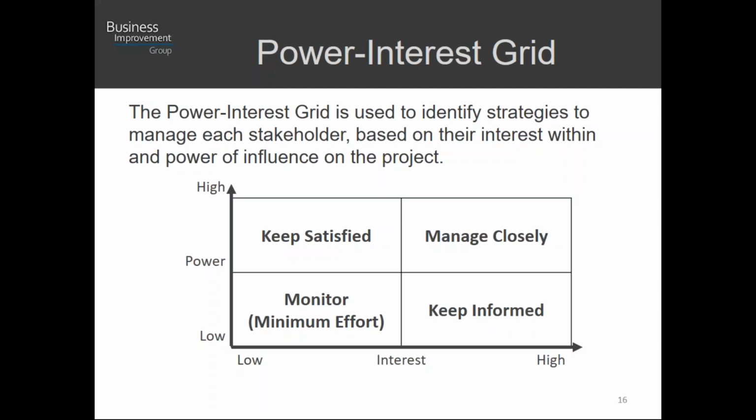Those that have high interest but low power, the low ability to influence the project, we want to keep those folks informed, right? They're interested in the project. We owe it to them to keep them informed how the project is going. For those that have high interest and high power, well, we want to manage those folks closely. Your project stakeholder will be there, your sponsor. Those are the folks that can gain or lose the most, and can also help influence the change that you're trying to implement. They're also the ones that can help you break down barriers. So you want to manage them closely.